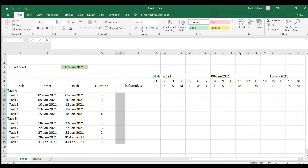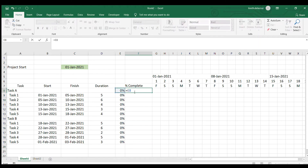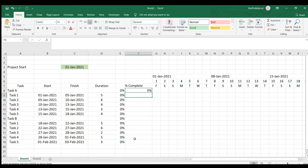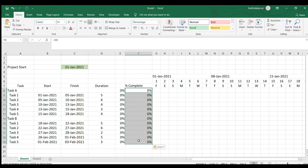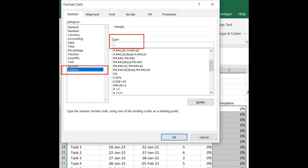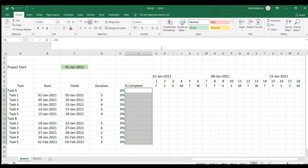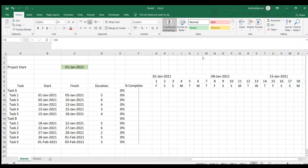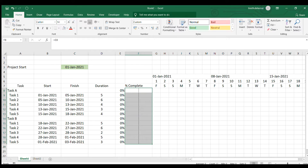Now let me work on the completion — this will be a percentage. I'll put a zero in these cells and then copy it here because I will make a data bar on this portion, which is equivalent to the progress. I'll hide the numbers using a custom format with three semicolons. This is now highlighted, so I'll go to Conditional Formatting and choose Data Bars — just choose the first data bar.